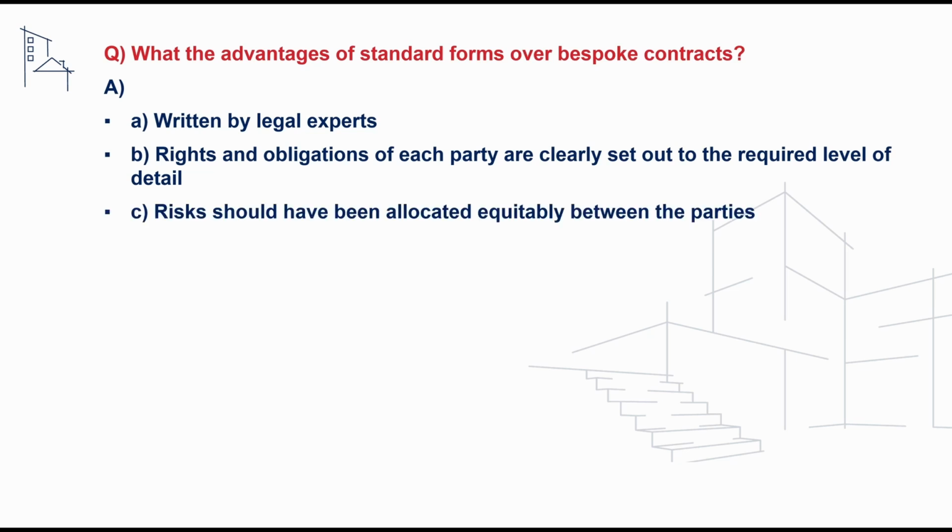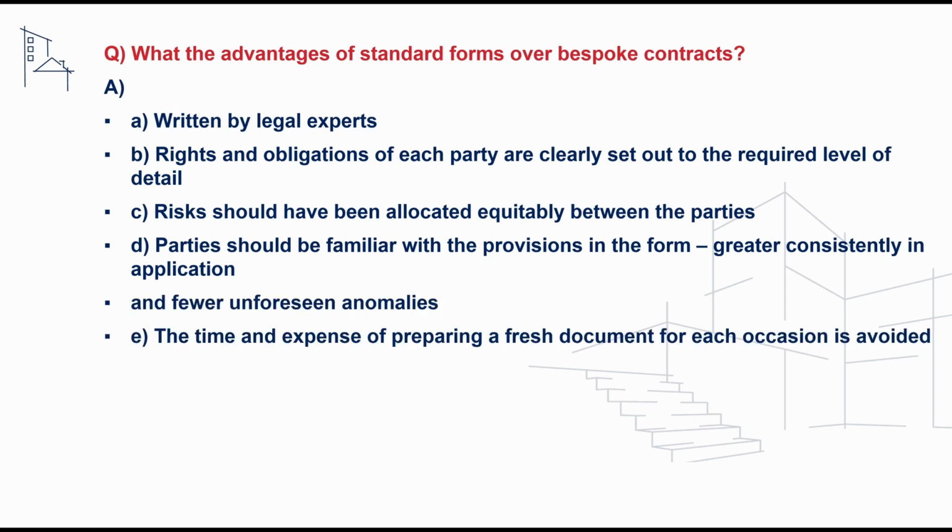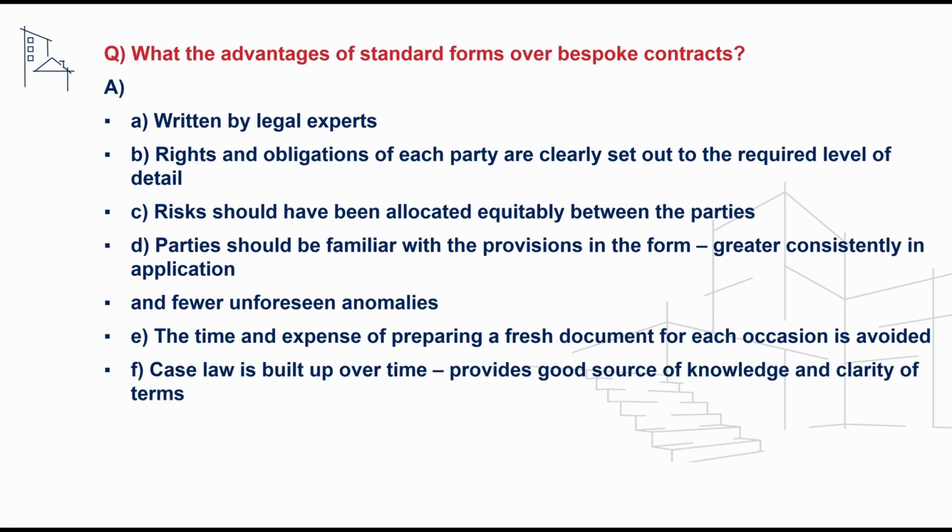Any risks should have been allocated evenly between the parties or appropriately, and parties should be familiar with the provisions of these forms, as there is greater consistency in application. The time and expense of preparing a fresh document for each occasion is avoided, and case law associated with standard forms is built up over time, and this provides a good source of knowledge and clarity of the terms.